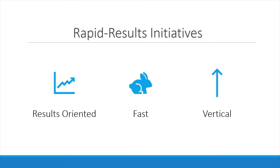Rapid results initiatives are the bread and butter of this article. A rapid results initiative is when a small team of people are tasked with delivering results of a large-scale project on a small portion of the target population. These teams serve as a model for when the initiatives are rolled out on a large scale. The three key components are that they are result-oriented, fast, and vertical, and each of these components go hand in hand to prevent a good project from failing.